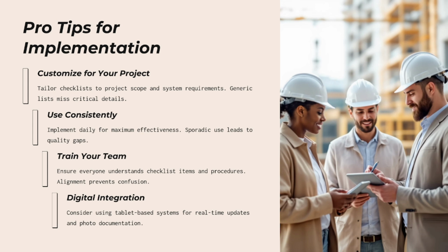Whenever you are checking the work at site, if you find something which is not done, you can take a photo of that particular work as proof. After that, you have to bring your own team and show them this is our standard checklist, and you should follow the standard of the works. Something which is missing at site is not acceptable at all, so you have to train your team in order to avoid any confusion or mistake in future. That is more important for your works.